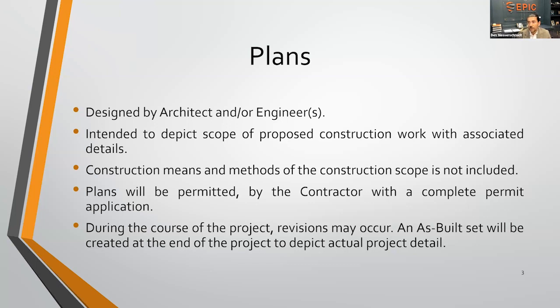Now, it's very important to know what the plans are intended to do. It is really to depict the scope of the proposed construction work with the necessary details. It's not intended to talk about means and methods and how to accomplish this goal. This is a generalized scope as to how to get things done. So you'll have your site plans, which is your overview, which I'll show a brief example of. You're going to have associated details on crucial locations, but it's not going to outline every single spot of how to roll on waterproofing, let's say. It's going to defer back to manufacturers' recommendations or their published data.